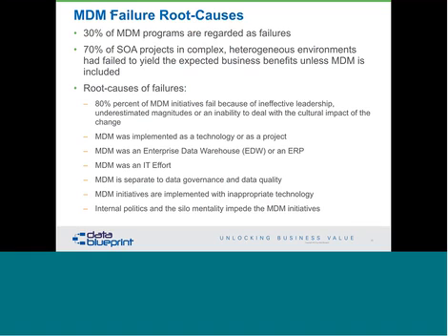And again, the root cause for failure here: leadership misunderstanding the magnitude, treating it as strictly a technology project, thinking that the master data management system was a replacement for either the enterprise data warehouse or the enterprise ERP that we were looking at, that it's strictly an IT effort, that it's separate from governance, separate from quality, that it's implemented with the wrong technologies, and that really politics and silos impede these initiatives.